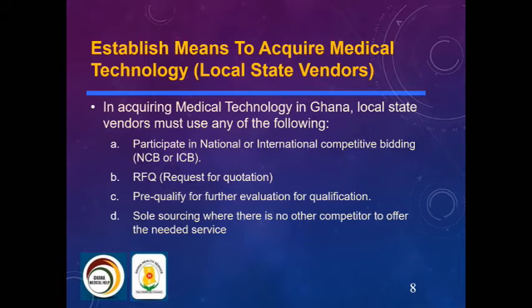So you want firms that have detailed information and know a lot about the job to submit a set of information to you, and you use that to make decisions. Firms that are qualified, you pre-qualify them. Then you use the information to ask these firms to write for further participation.